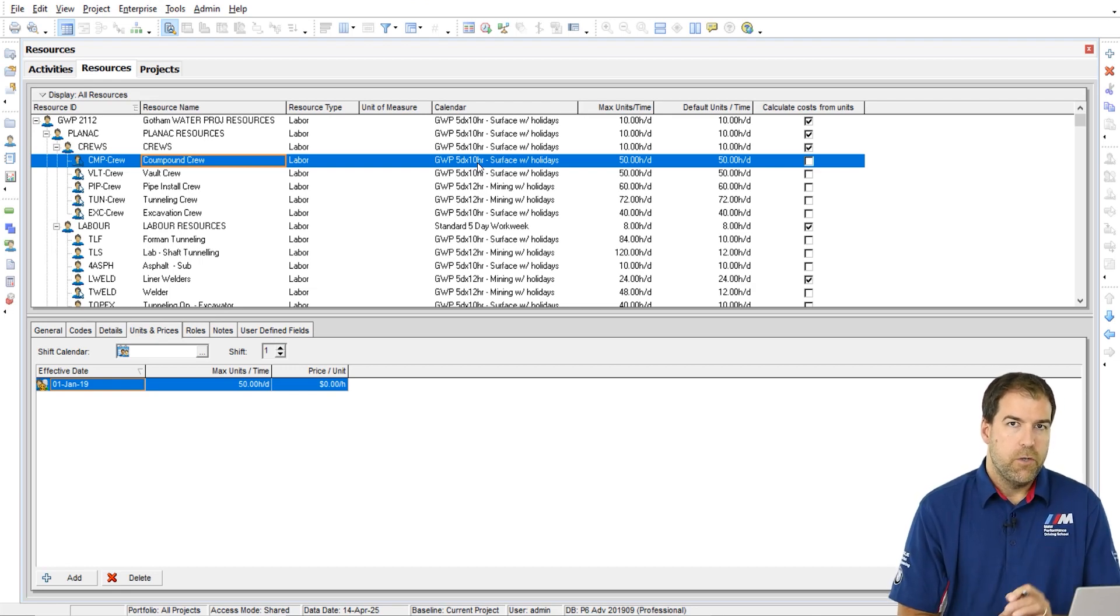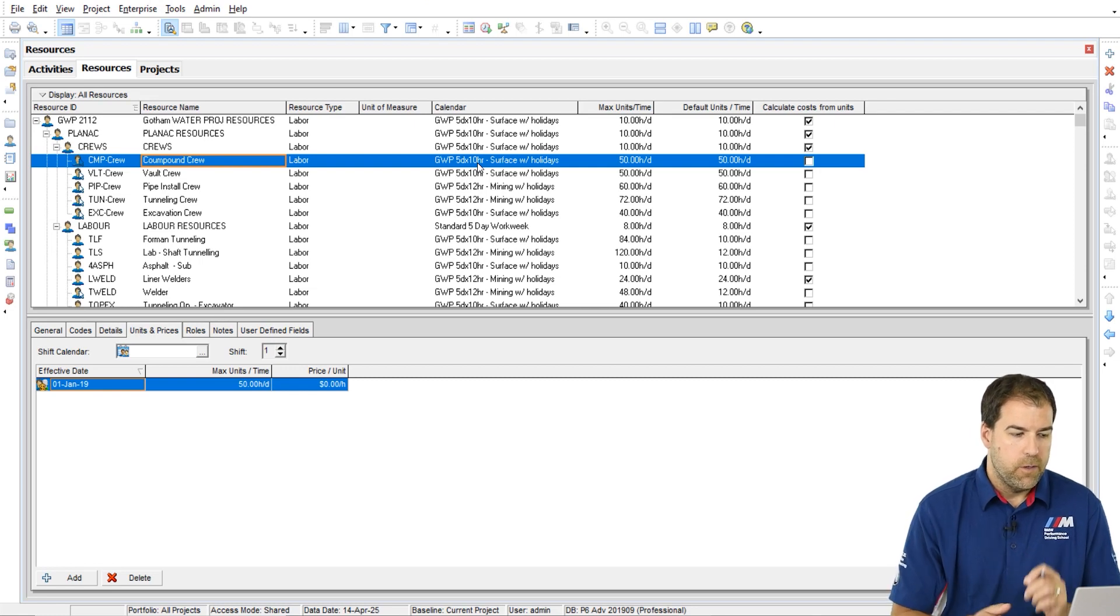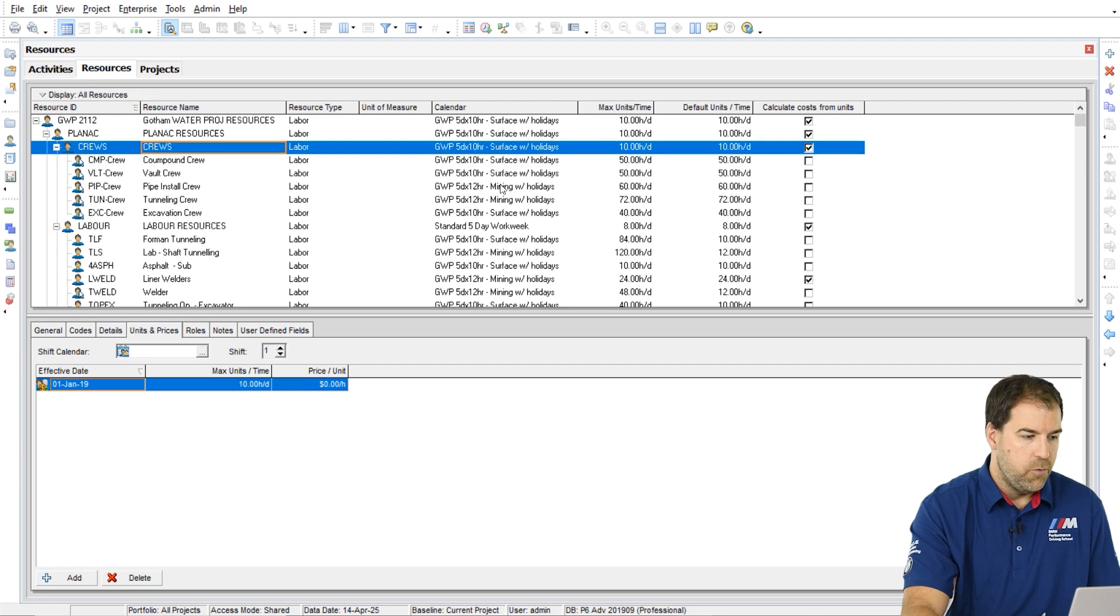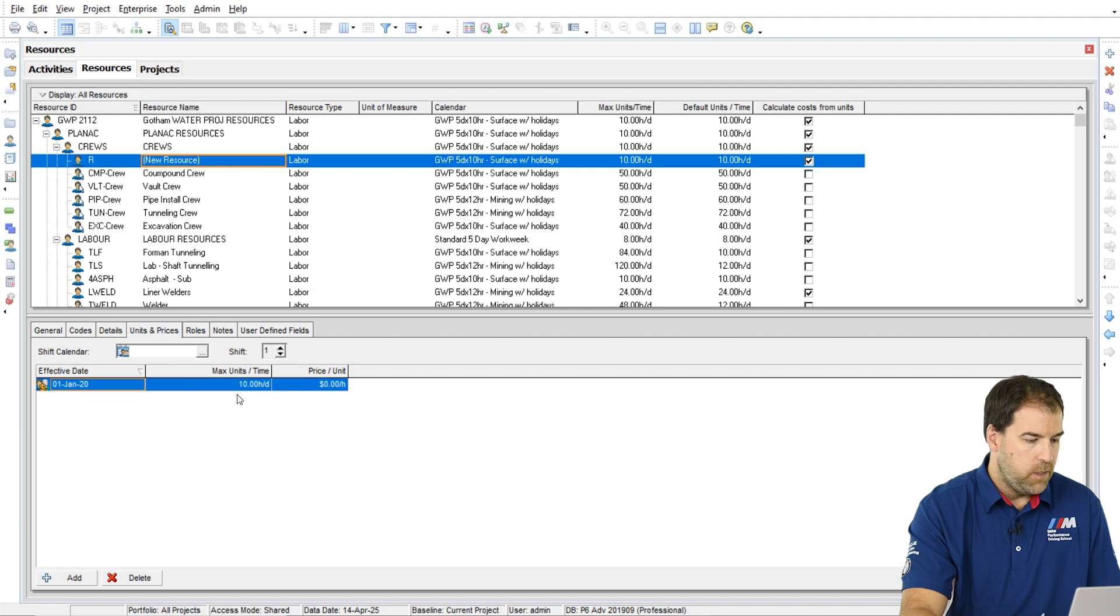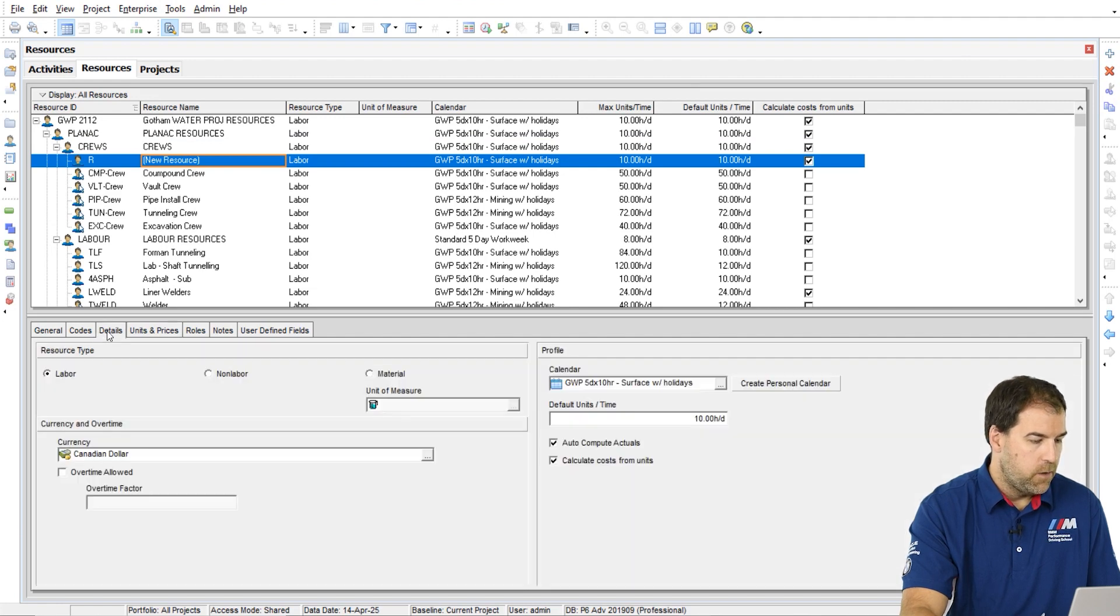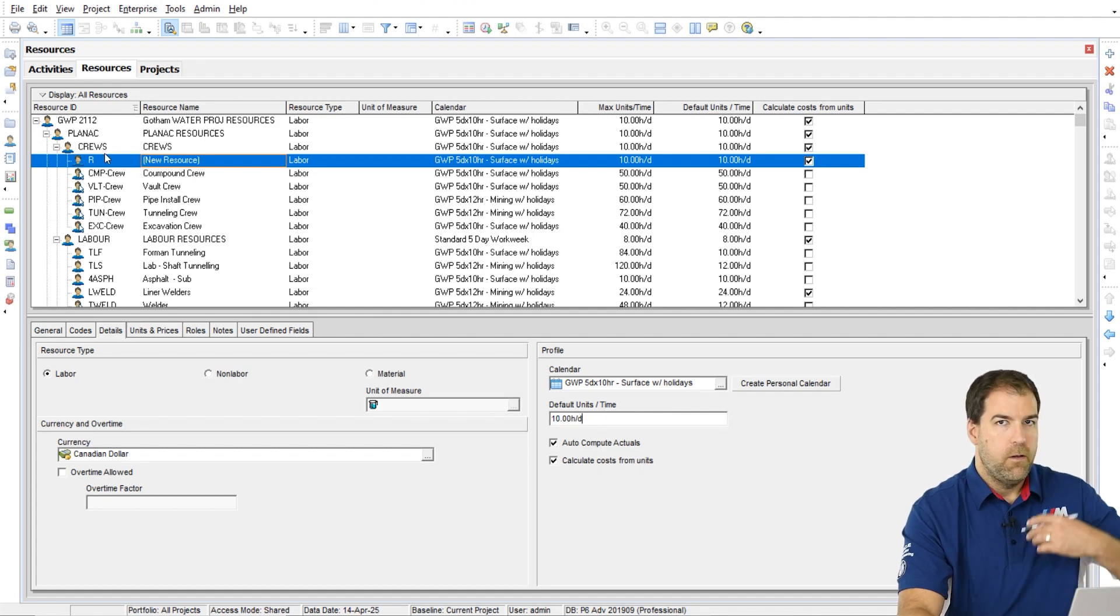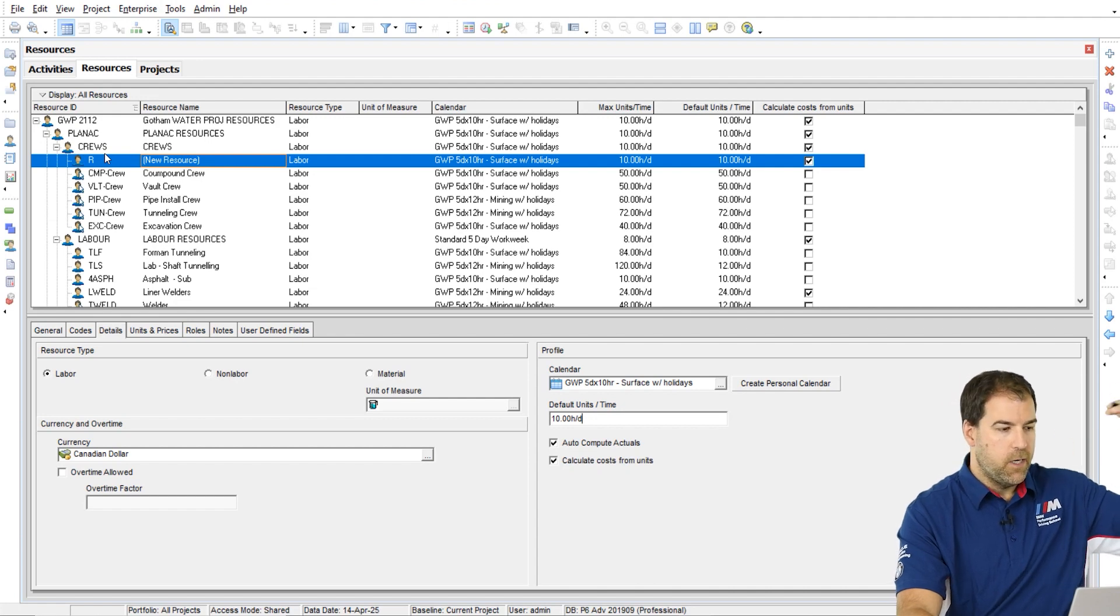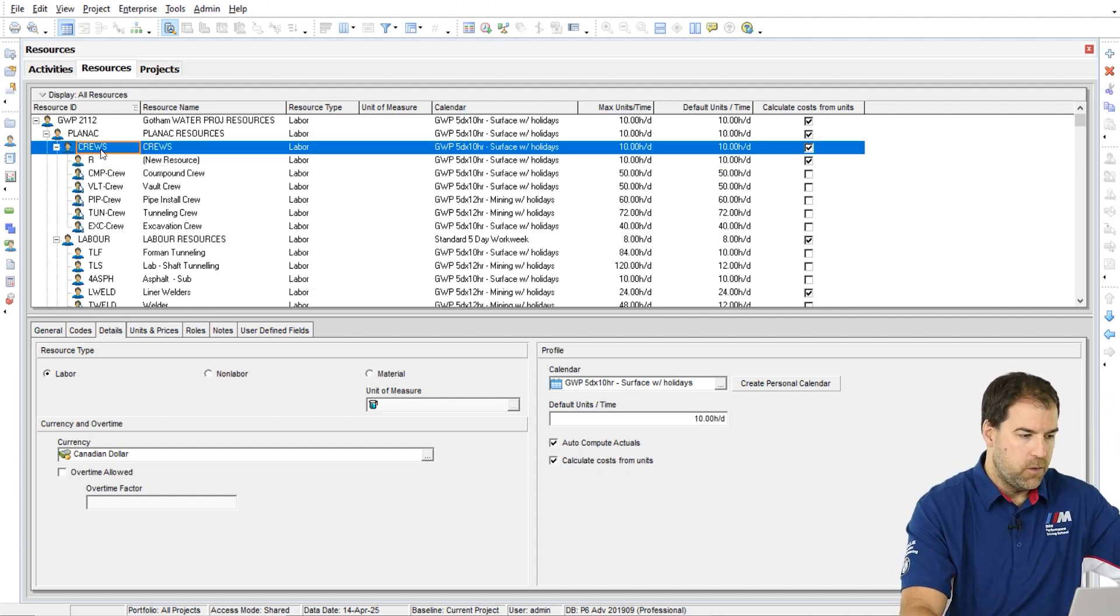I'm just going to show you this. I was just playing around and I think it's important that you understand the default. So watch this. If I add a new resource, see it picks up automatically 10 hours per day here and 10 hours per day. It picks up those values from the resource that it's in the hierarchy above it, so the parent resource.